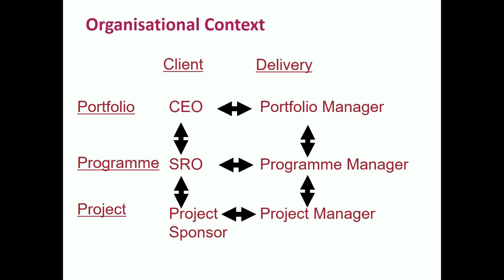Just a small vignette. And for those who are very familiar and comfortable with job descriptions, in project world, in program world, I'd always encourage you, don't talk about roles and responsibilities. Talk about roles, responsibilities, authority, i.e. what delegation is that role being given, and accountability. To whom is this role accountable and for what? If you can get that correct, you're halfway to solving your governance challenges.